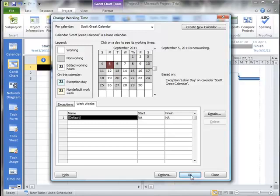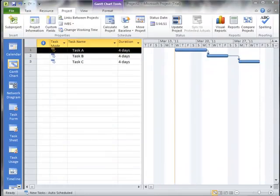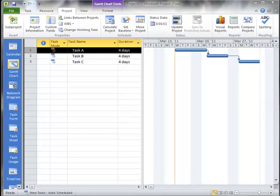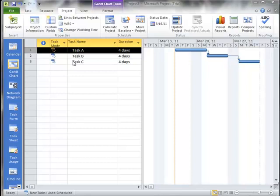So hopefully that gives you a good idea of how we can alter the calendars in Microsoft Project. I'll show you a way that we can actually now take this calendar and make it available to other projects as well. One of the ways that we could do this is we could simply save this project, delete the tasks that are out of it and use this as a template for starting new projects. That is not a bad idea, especially if you're working in a computer lab or something like that.